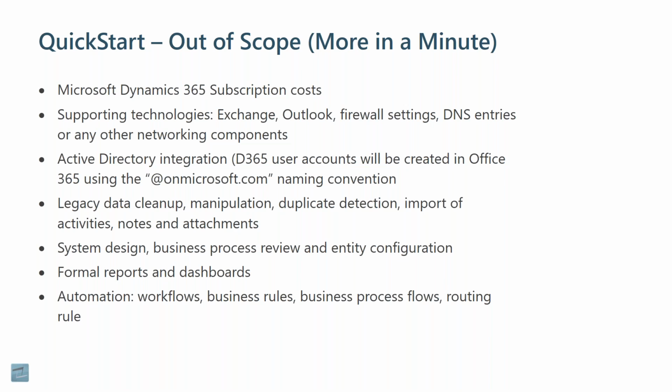The legacy data scrubbing, I did mention clean data from the start is going to be imperative. That's where we would have to lean on you to get that data in an organized and clean fashion. So any manipulation, any scrubbing, any duplicates, working with that data, polishing that data, that's where we would need to lean on you to get that in place for us. But outside of that, any importing of activities, notes, and attachments, if you are coming from a legacy system that has capabilities like this, that's out of scope as well.